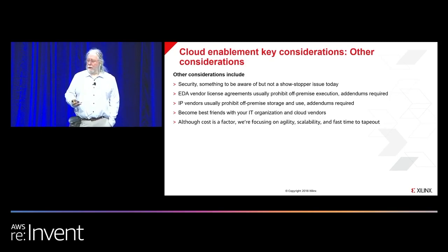Where the cloud will give you a benefit is being able to get peak licenses the same day, and then be able to burst overflow into the cloud on peak hardware the same day. That's the agility you get, is to mitigate a tape-out slip. Not even to pull tape-out in, just to stop a slip happening.